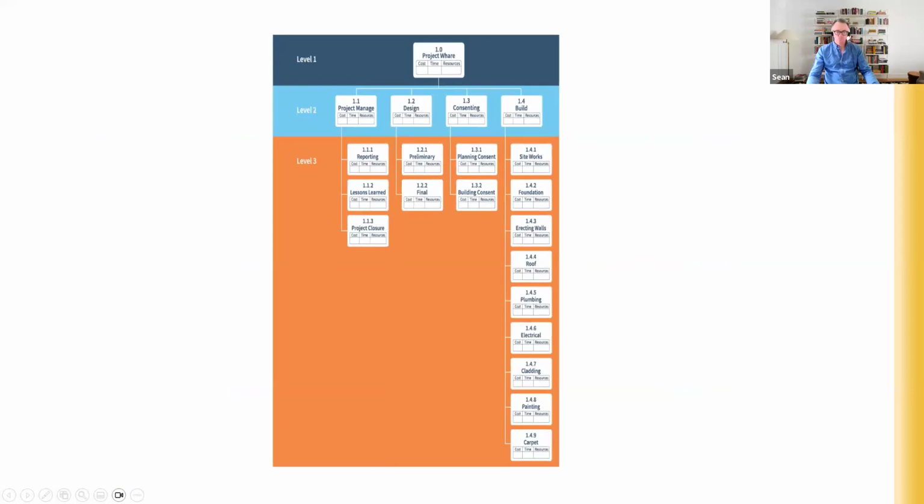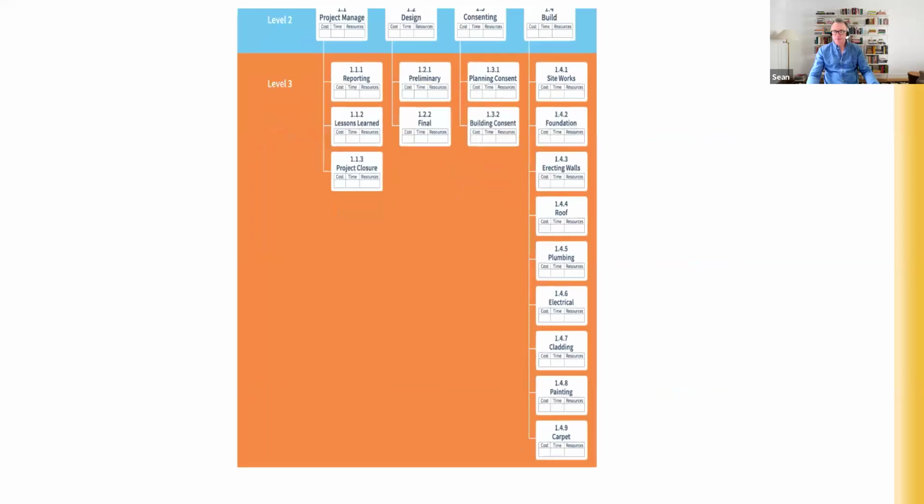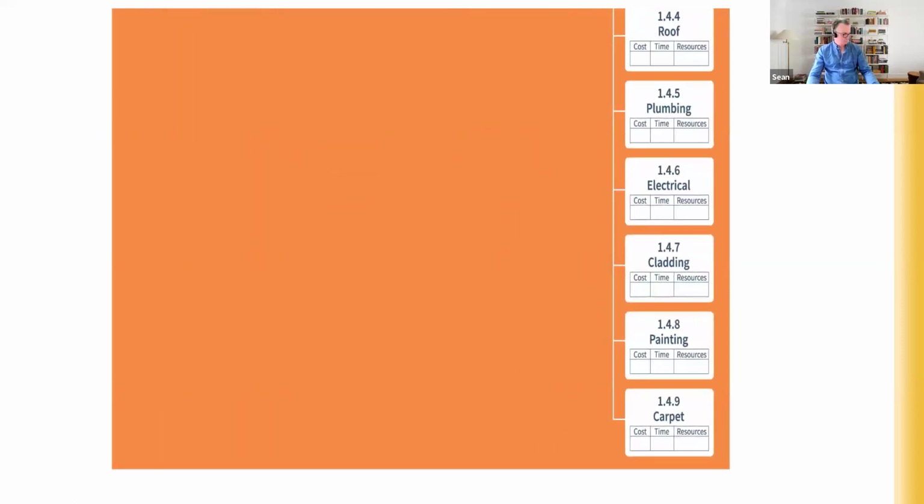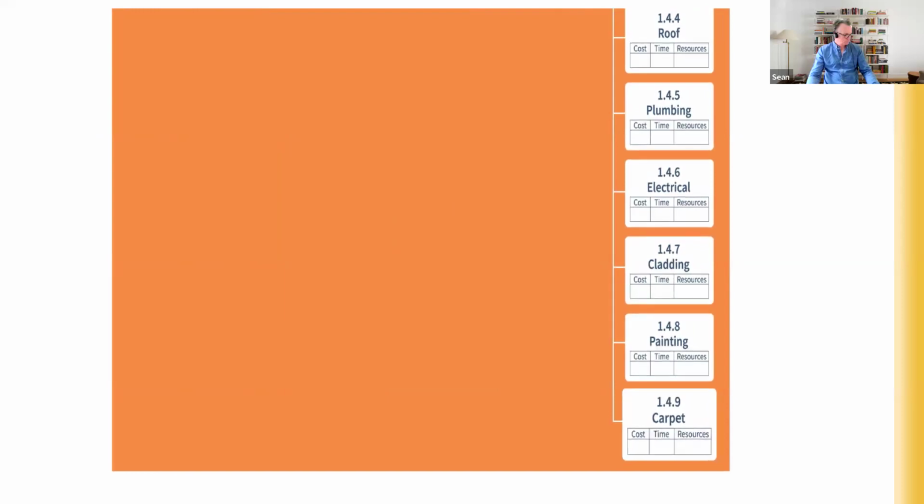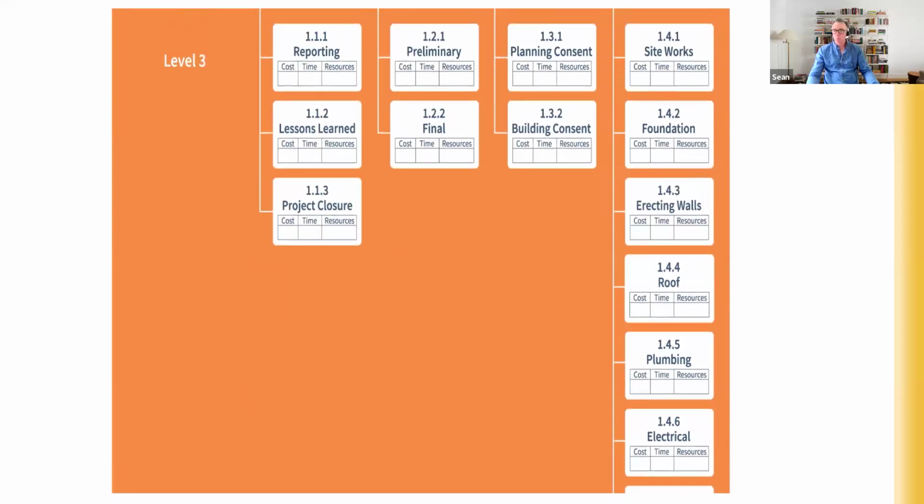Now that we have the work breakdown structure in front of us, we can see how bottom-up estimating can be so effective. Bottom-up literally means taking the estimates from the bottom of the work breakdown structure and adding them up to get an aggregate estimate.